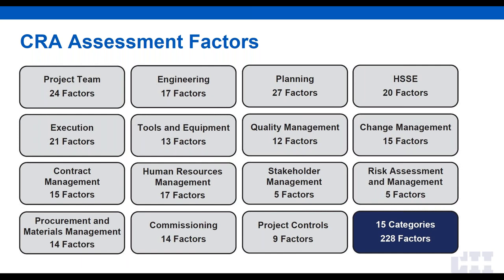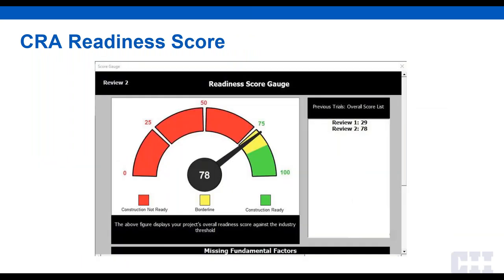Starting construction too early is preventable, and we should always make sure we're ready before starting. If we go ahead and start too early anyway, the expected risk is 25% more cost, 40% worse productivity, 7% more rework, 26% more change, and taking 28% longer. I don't care how big a hurry we think we're in — I'm not sure anybody would knowingly take on that kind of risk. If you're pressured to start construction too early, share these results with the decision maker. The construction team answers 228 questions in the workshop and assigns corrective actions for those items that need them. The factors are grouped into 15 categories that affect readiness to start construction. We'll be hosting a 60-minute webinar specifically for this tool next Tuesday, May 19th from 1 to 2 p.m. Central Time.